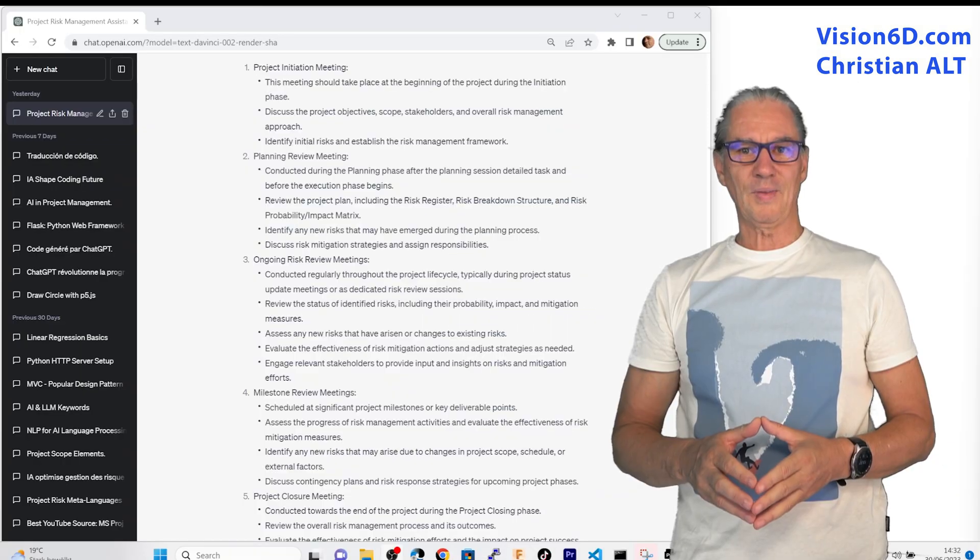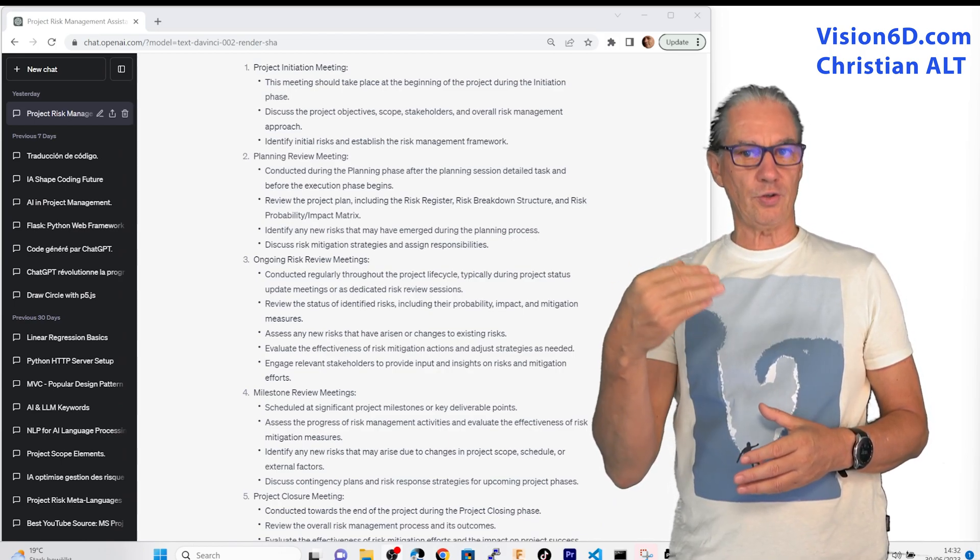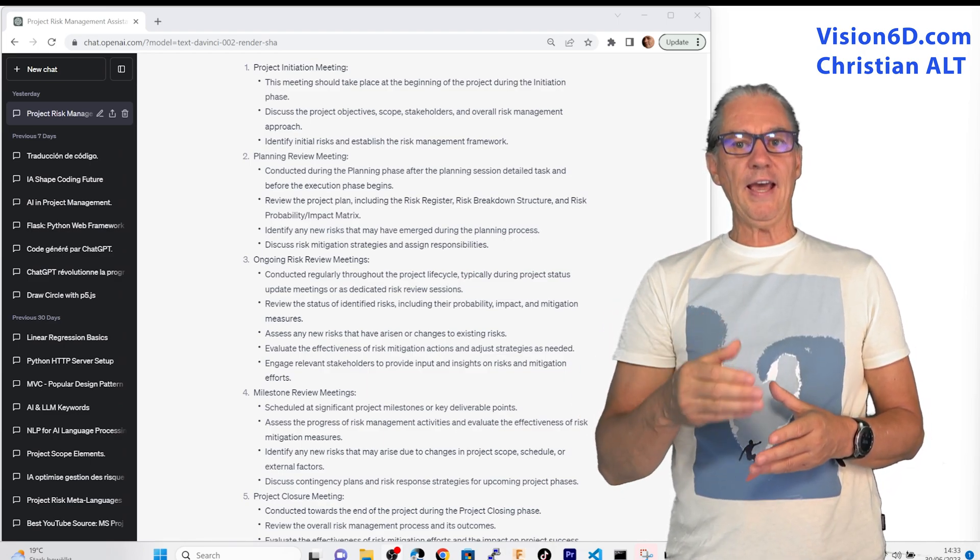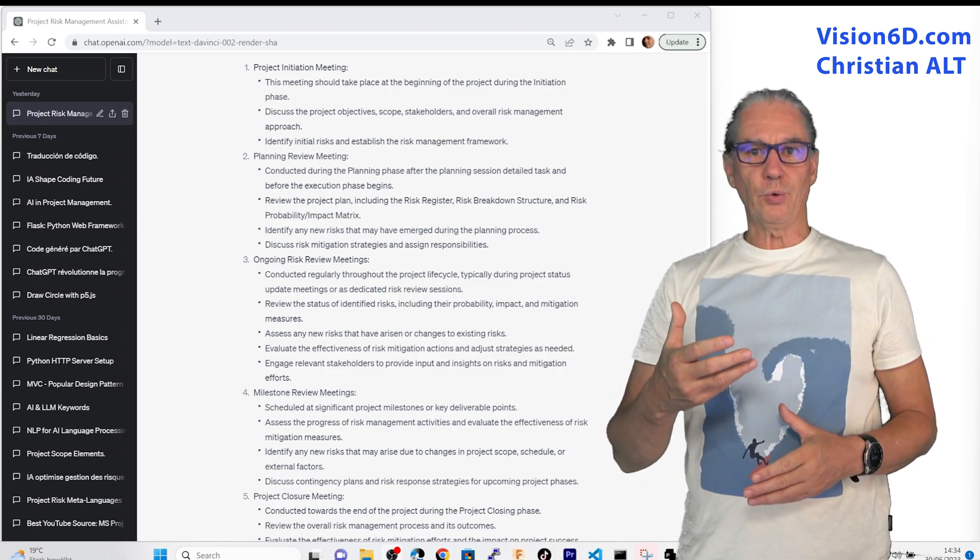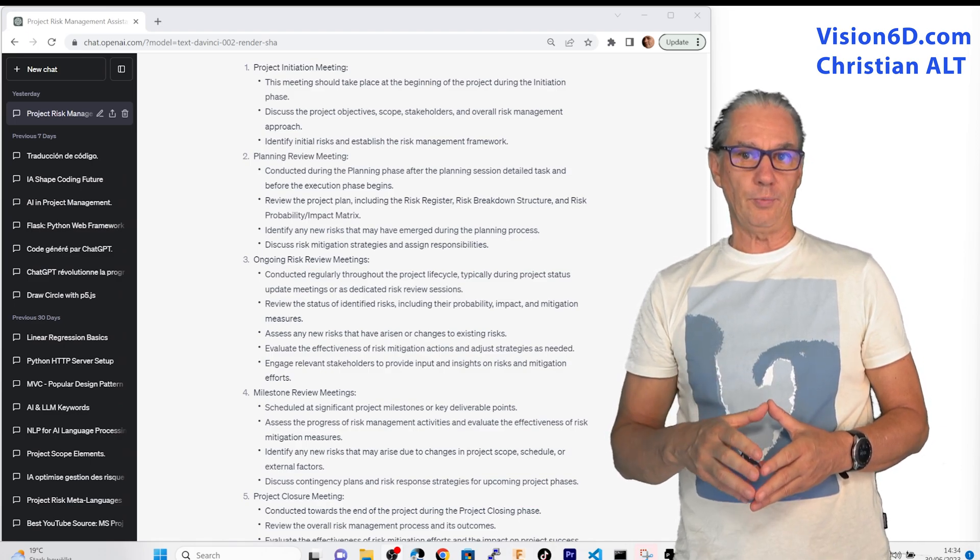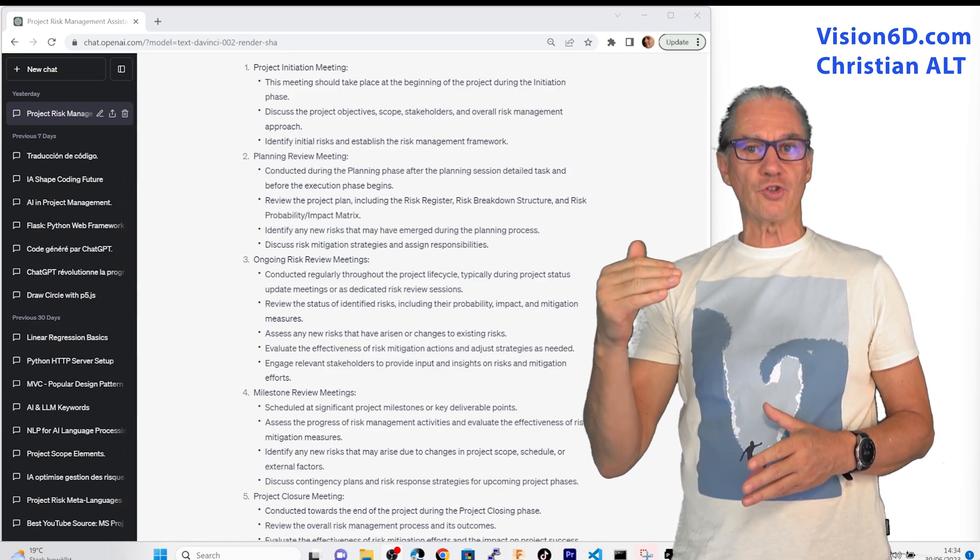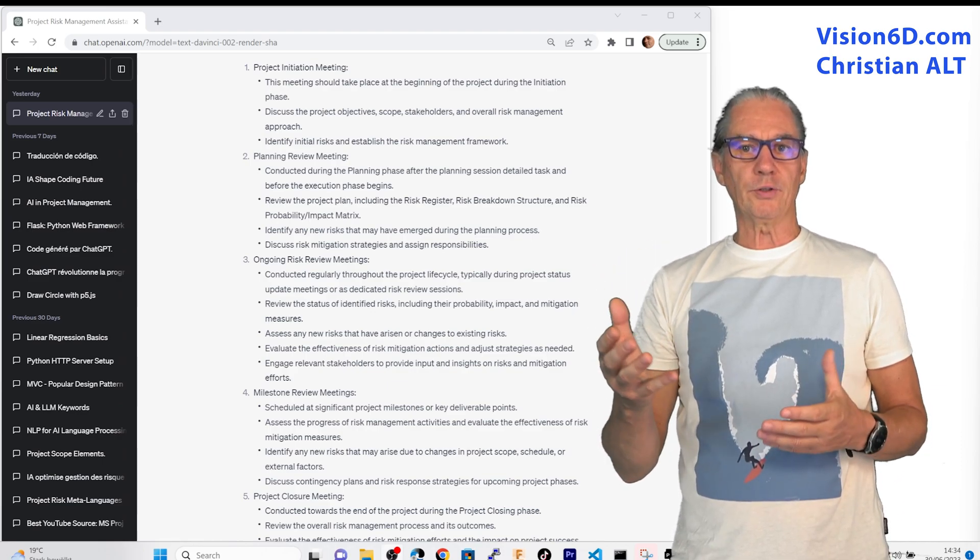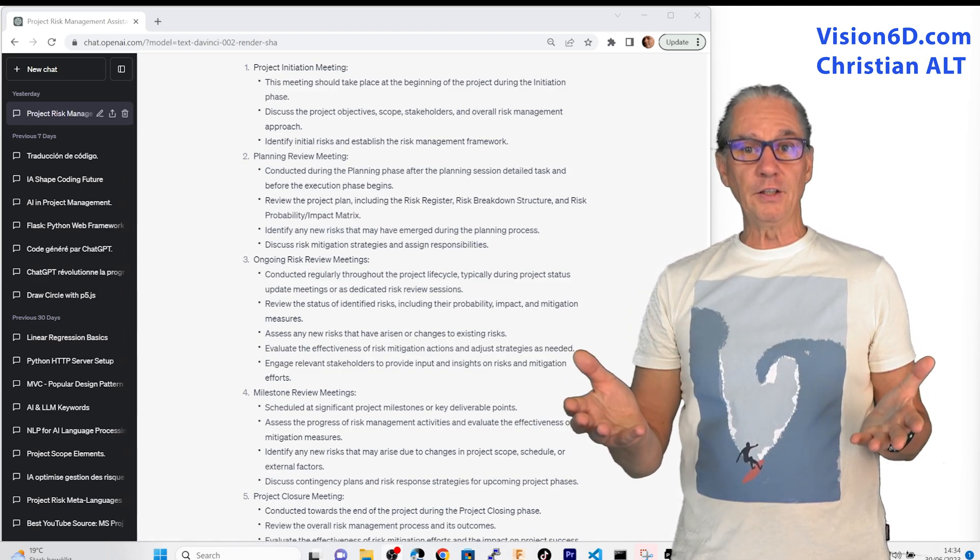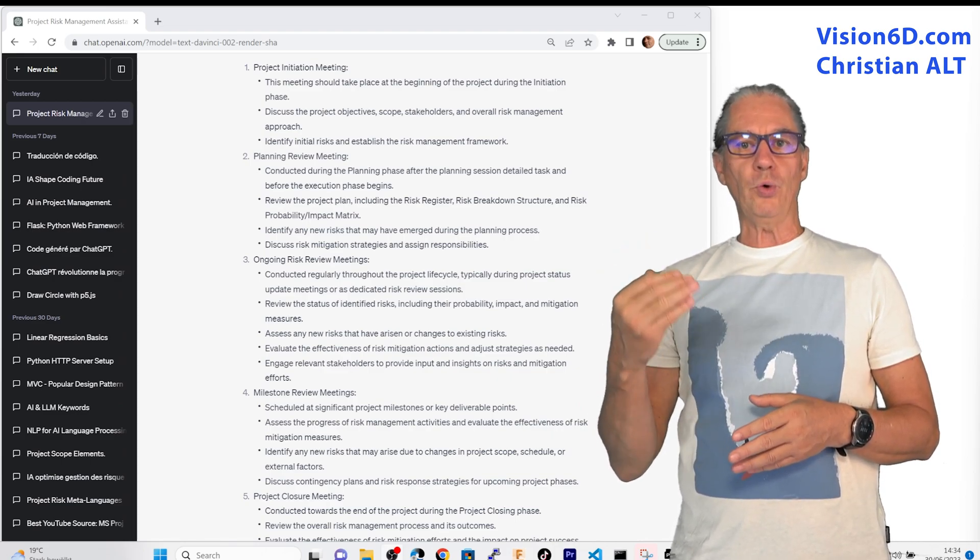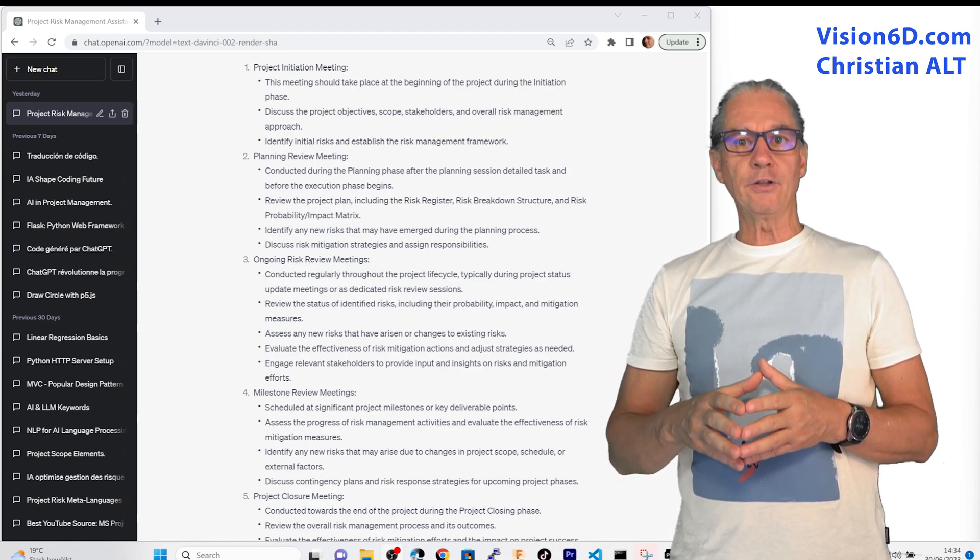So the first meeting he suggested was during the initiation phase. A second meeting it's to review the planning. At that moment you can already consider the risks that you have in the project. Then after we have ongoing reviews during the execution phase of the project and the fourth type is when we have a milestone, when we've reached something. There can also be a risk review to assess whether the way we manage the risk is fine or not or can be improved. And finally at the closing point, in the closing meeting we review the way we were handling the risks in order to learn something and to improve for the next projects.